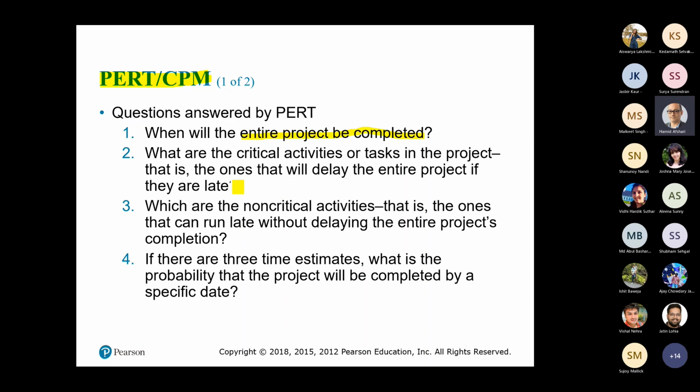Why? Because, based on what we discussed, you know that any delay on the critical path would delay the entire project. So if you have extra resources, if you have more effort, you need to put them on critical activities, the activities that are on the critical path.